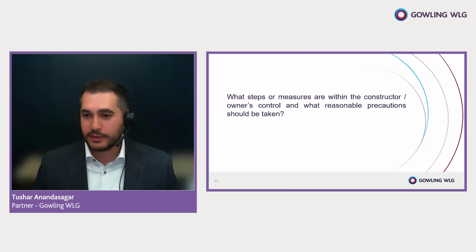These include selecting qualified and competent contractors. I think that's probably the one that sticks out the most, with a strong track record of safety compliance. We have to ask these questions, folks. And then embedding, Sahil, this is sort of delving into your zone, and I will turn to you shortly. Embedding health and safety obligations into contracts, including specific references to OHSA responsibilities.